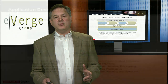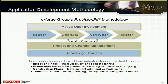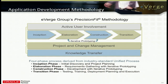Let's look at the methodology itself. There are four stages: inception, elaboration, construction, and transition. Loosely, you can think of these as scoping and requirements, design, development, and go-live. There are several key principles you'll see throughout that we're going to speak to for the rest of the presentation.